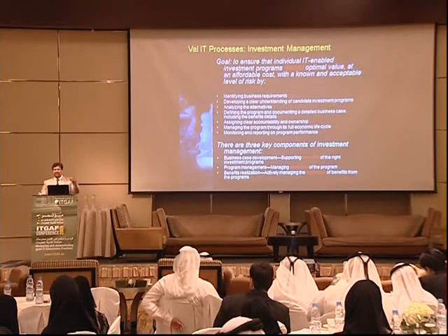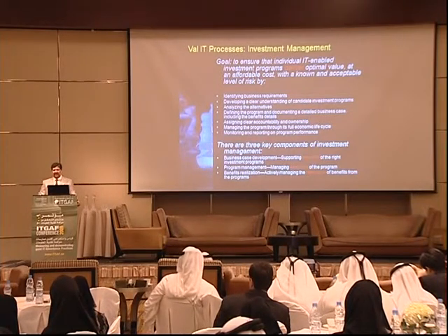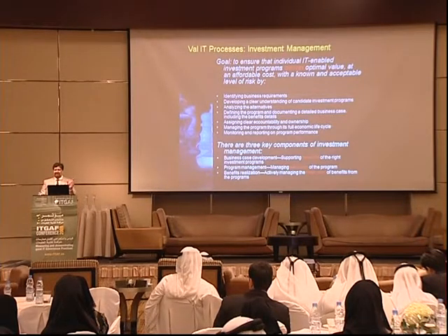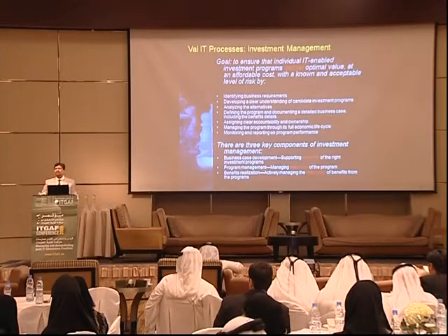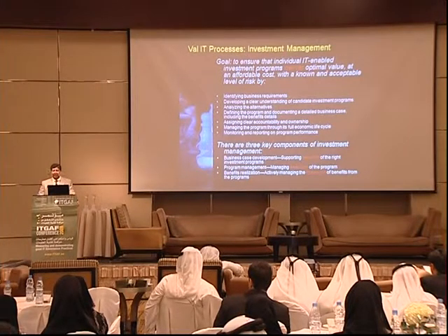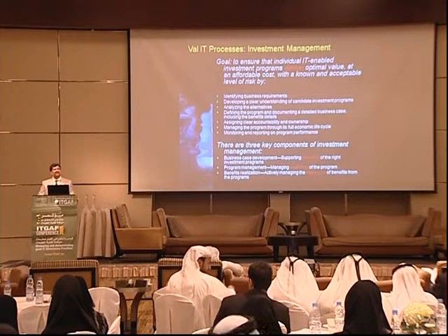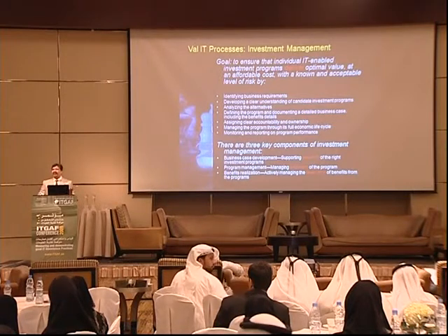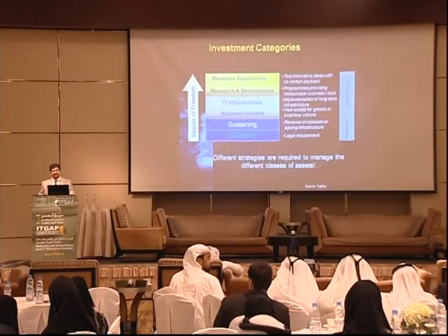It tells you what the key things are that you need to do. It also tells you there are 3 key components of investment management. You need to have a business case development, which means you select the right projects, because if you don't select the right investment programs or projects, then ultimately you will end up with bad investments. So you need to have a system of program management, which is managing execution of the program, and you need to have a system of benefit realization. So you know that you've derived benefit from that particular project.